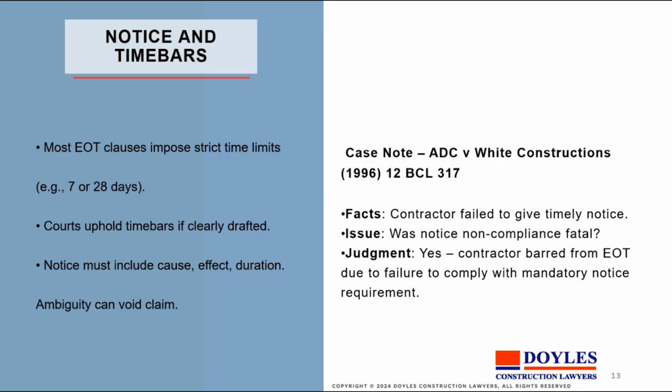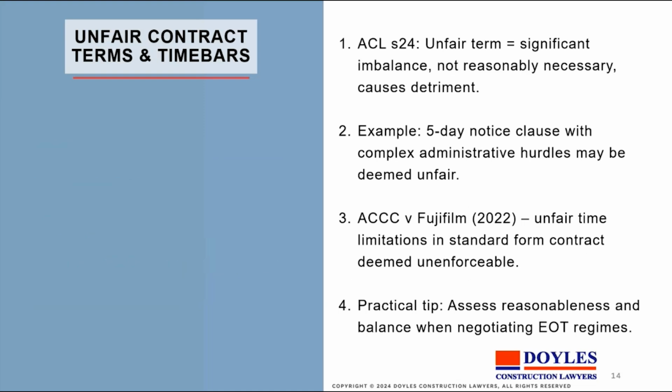It's one thing to say that you've got to notify within, say, 7 days, which means you have to notify effectively once a week. But if you have to notify every 2 or 3 days, it often becomes a very onerous burden, because it doesn't fit into the cycle of your management of the job as per every week. And it means that instead of notifying 4 times a month, you're notifying 15 times a month, depending on the time limit. So it's important to negotiate a proper basis.